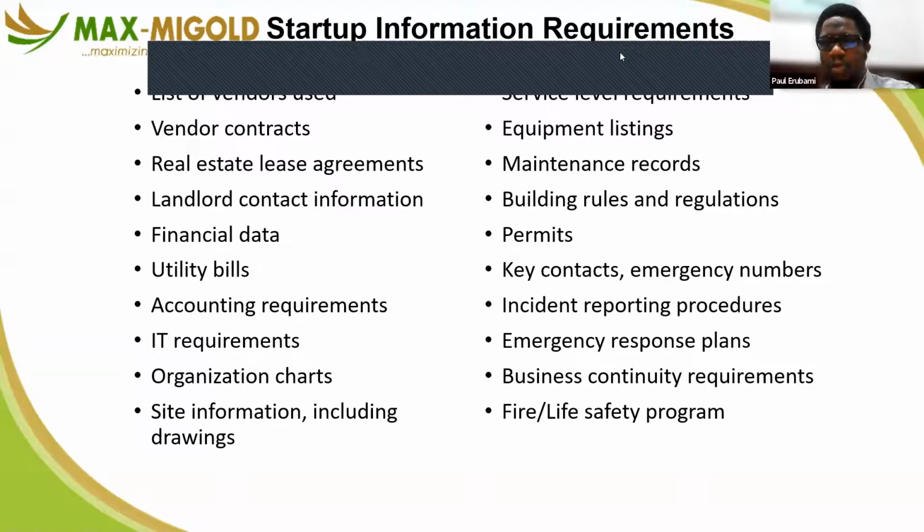They don't have maintenance records to know how the equipment has gone from where it was to where it is now. No contacts, no information, no documentation to give me insights. They now expect me to come in there as a contractor, because I'm looking for work, and start counting your toilets and your doors, measuring your floors, looking at your drawings, and finding out which of your assets are still under warranty by going online, putting in serial numbers and checking one by one. That's just too much work.